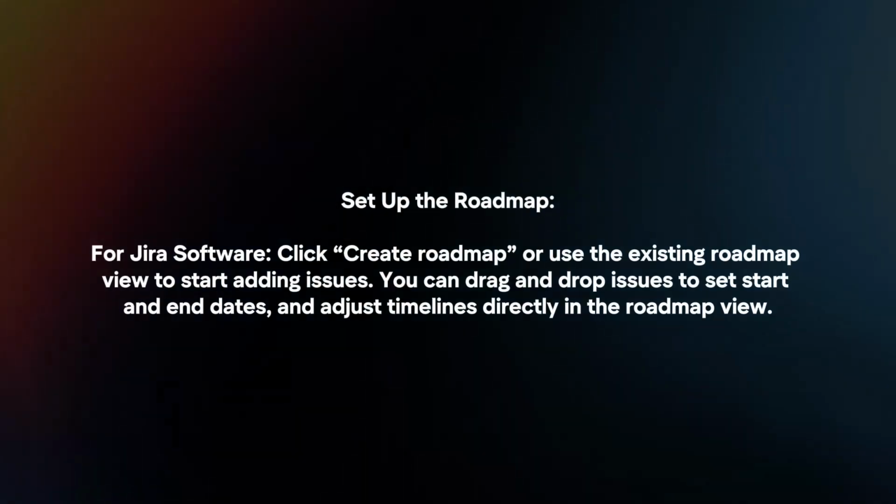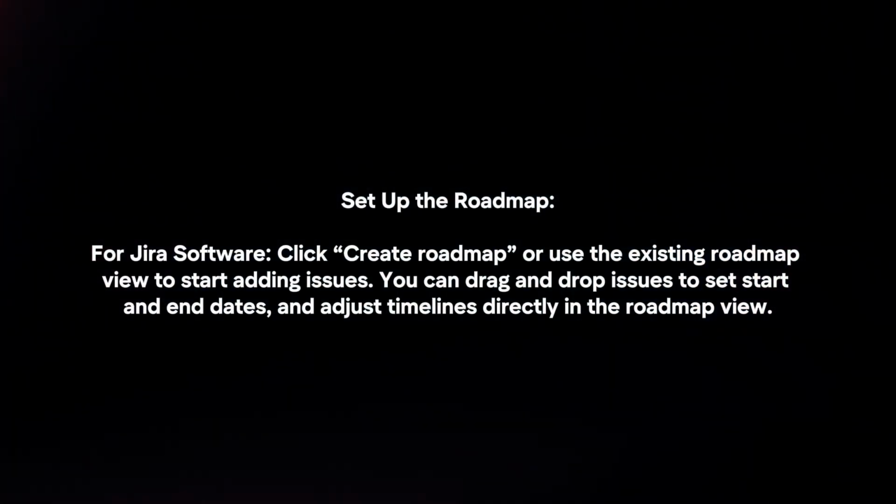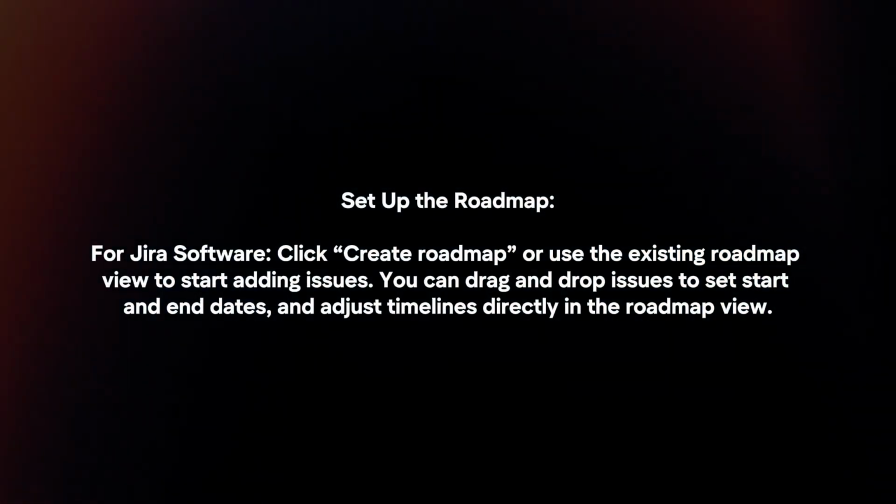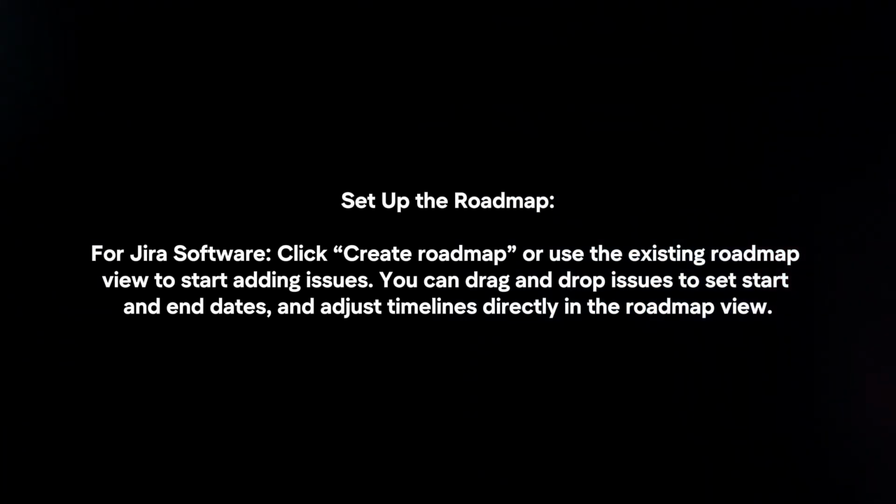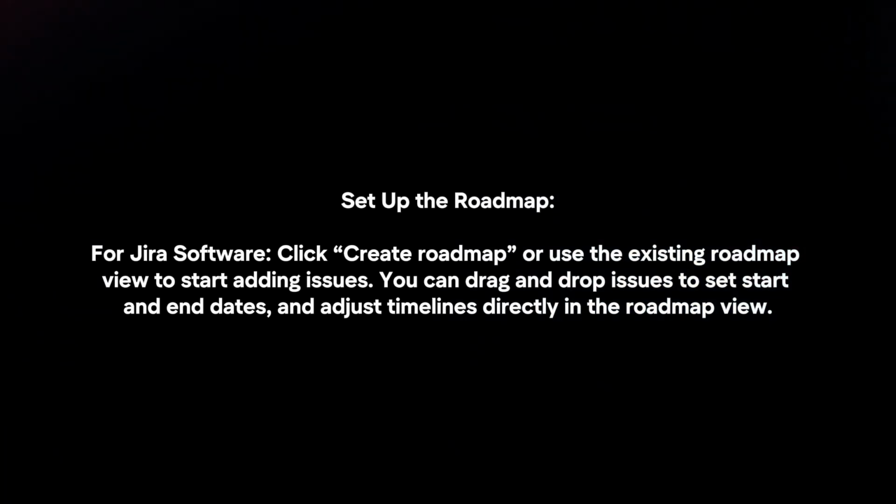Set up the roadmap. For Jira Software, click Create Roadmap or use the existing roadmap view to start adding issues. You can drag and drop issues to set start and end dates and adjust timelines directly in the roadmap view.